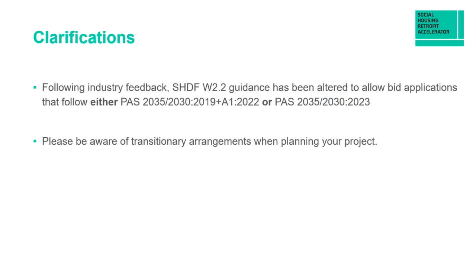How do all of these new changes impact your SHDF Wave 2.2 bids, really? Following industry feedback, the department have provided some guidance and have indicated that the Wave 2.2 guidance has now been altered to allow your bid applications to follow either standard. You can follow PAS 2035 2019, or you can follow the new PAS 2035 2023 standard. But please be aware of transitionary arrangements when planning your project.